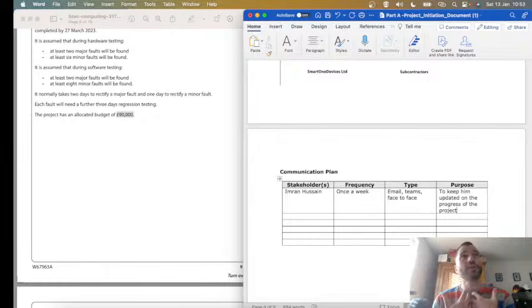When you work on a project as a project manager, you usually work in an agile way in sprints. If the sprints are 1 week, then you would report back to the client after each one, though usually it'd be 2 weeks. So let's say you're going to have 2 week sprints, so you're going to talk to him once every 2 weeks at the end of every sprint.